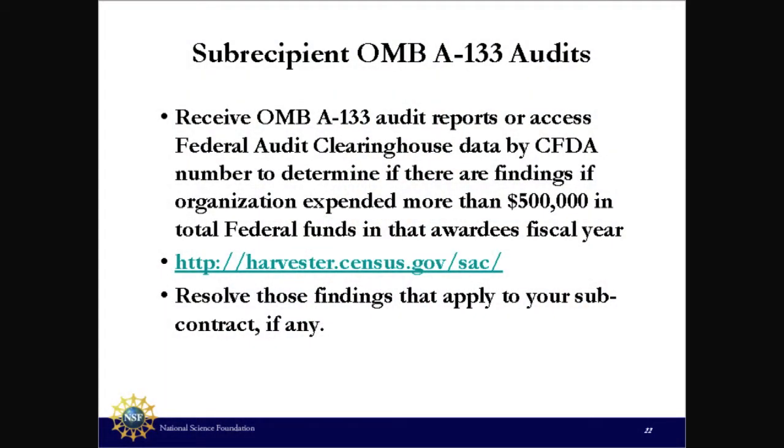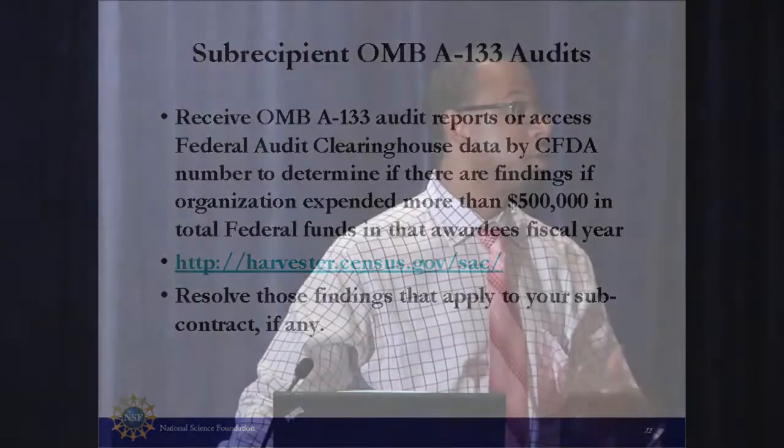All right. And like I was saying earlier, when you're asking about your subawardees, ask if they have an A-133 audit. And if they've done one in the last few years, ask what the findings were. As the prime awardee, you are allowed to get this information. I've had a situation where a grantee says the subawardee will not give me their A-133, and I quickly tell them they're in violation. So you can do two things. You can cancel and terminate that and start somewhere else, but always talk with your program officer, because these things happen. It's amazing how much of a power struggle there sometimes is between a subaward and the prime. It becomes this war of the minds, and it can get very, very testy, to say the least. And sometimes they don't want to tell you everything. But the beauty is, as the prime, you are allowed to get that information.